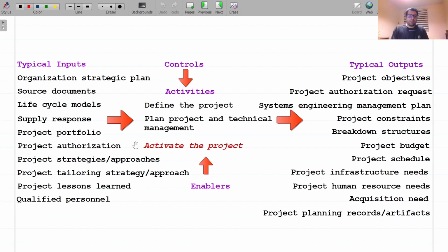Defining project objectives, value, and the criteria for success are critical to guide project decision making. The project value should be expressed in technical performance measures or TPMs. Incorporate risk assessment early in the planning process to identify areas that need special attention or contingencies. Always attend to the technical risks.